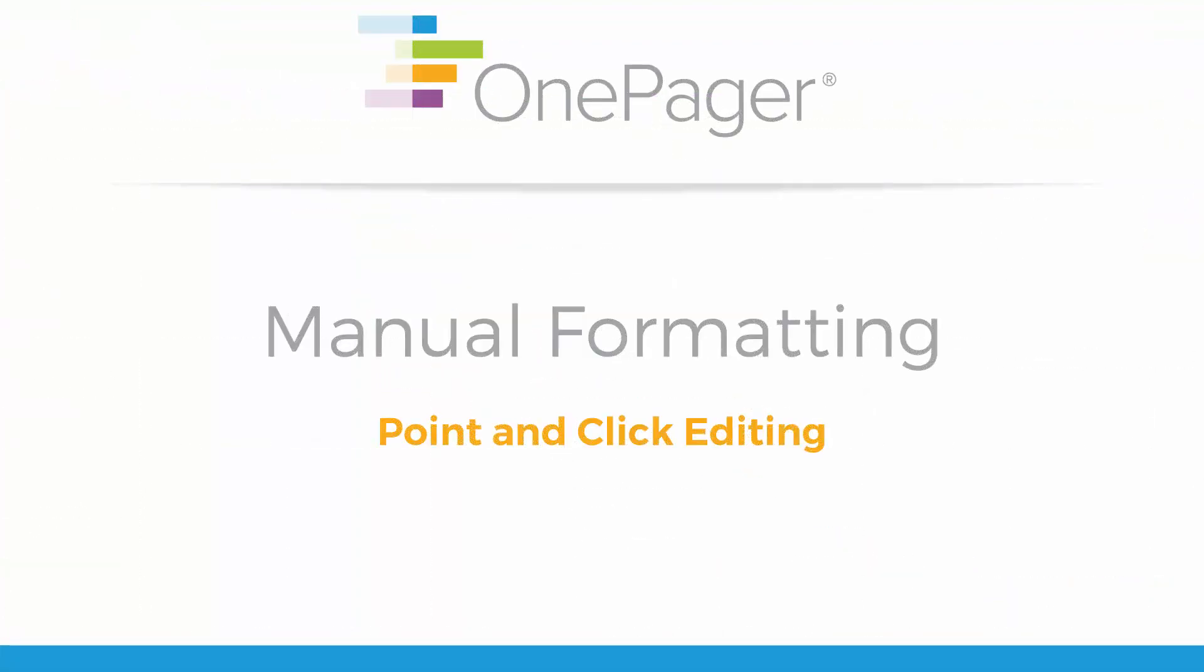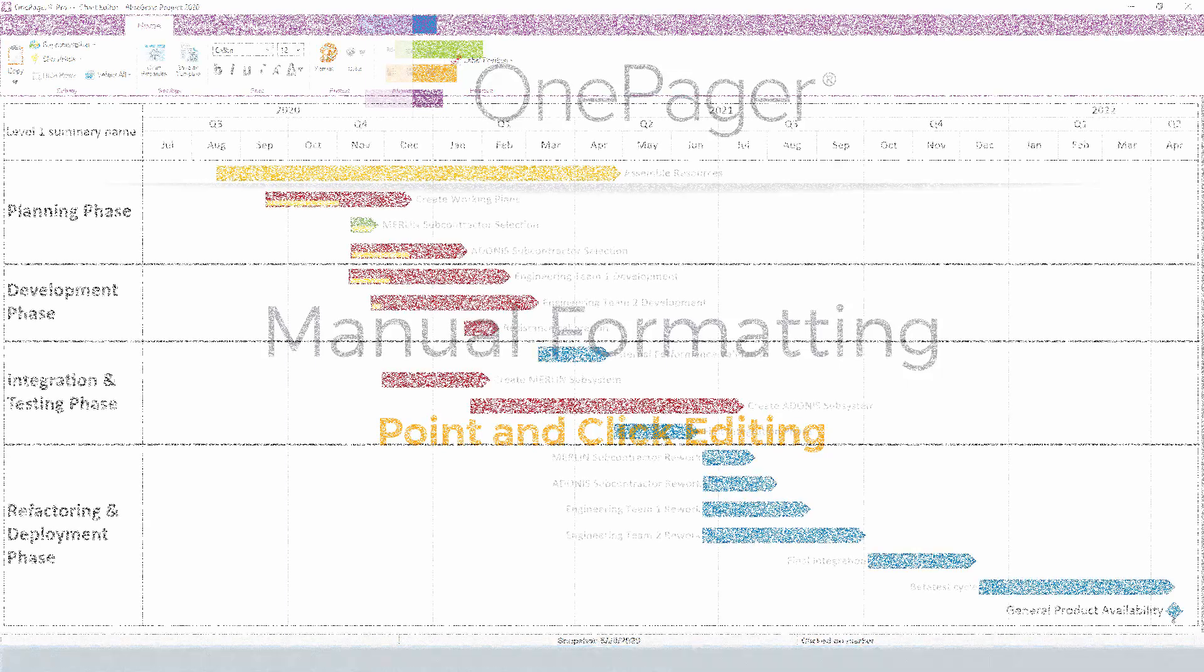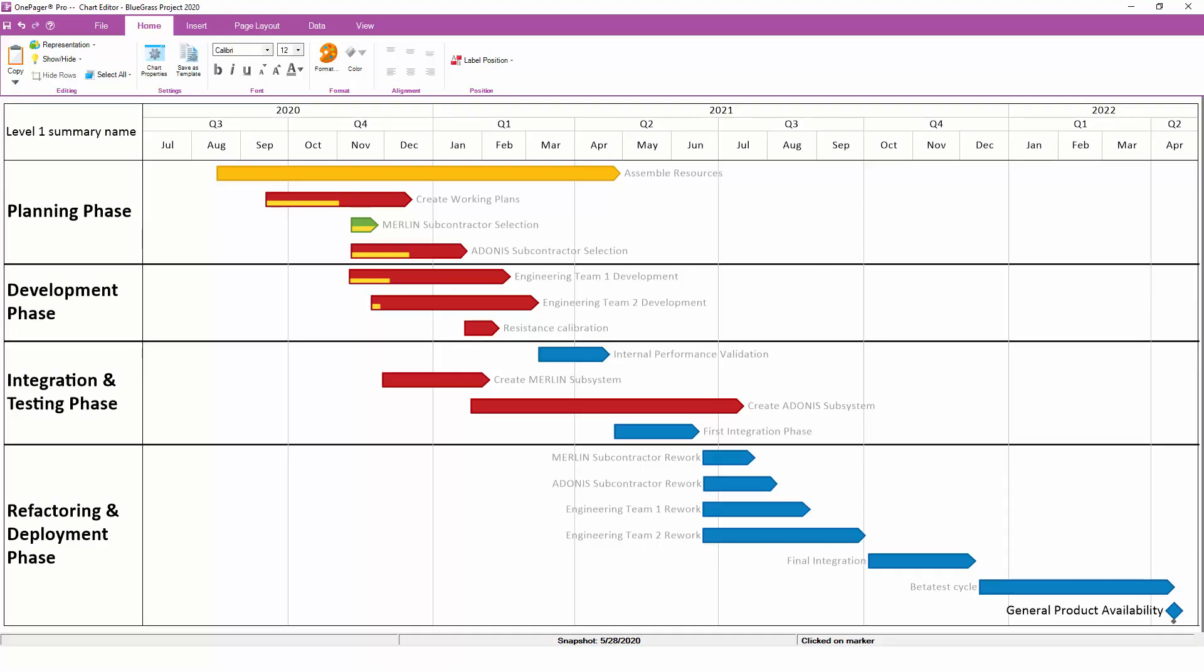The second way to make changes to your OnePager chart is by doing your formatting manually. We generally discourage manual changes if you can make those same changes through Chart Properties. There are a few reasons for this. First, changes that you make manually do not necessarily reflect the reality of your project plan, so there is always a question of data integrity. For example, if you set up conditional formatting to assign color by status, you have a good degree of confidence that a red task is actually late.